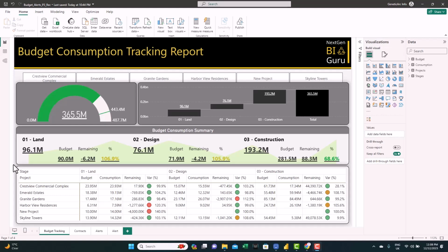So simply we want to design a workflow that you can initiate to collect mitigation whenever the budget exceeds more than 5%, like for those ones. It goes to the project owner or the budget owner to ask them to provide their mitigation, and it should automatically feed back to the dashboard.